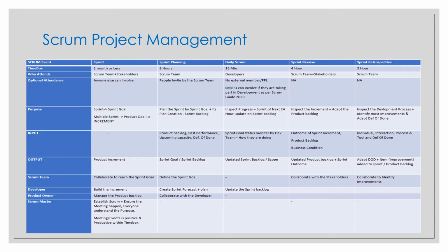We just went through the three artifacts. Product backlog: generally a backlog represents a build up of unfinished work. So a product backlog contains undone things that are related to the product. You can see it as a to-do list. The backlog needs to be continuously improved and ordered. Higher priority items will be listed in detail, and the remaining lower backlog items will be less descriptive. I'm explaining this to give you the entire overview of Scrum project management, how it works, and what all things are there. We call this activity refinement.